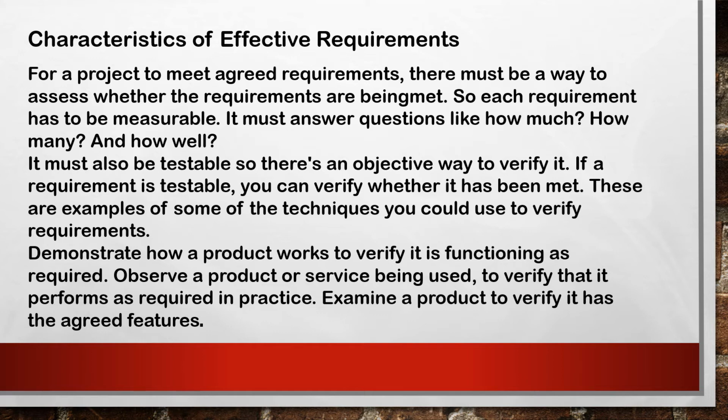There are some examples of techniques you could use to verify requirements. Demonstrate how a product works to verify it functions as required. Observe a product or service being used to verify that it performs as required in practice. Examine a product to verify it has the agreed features.